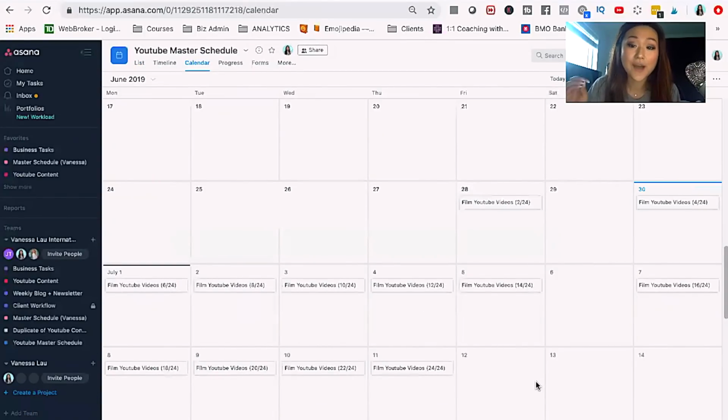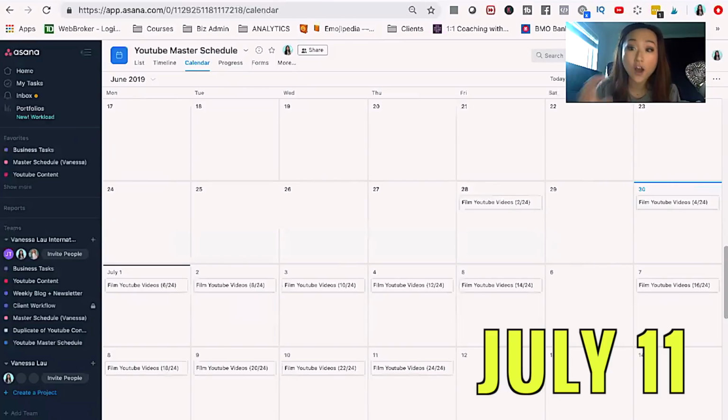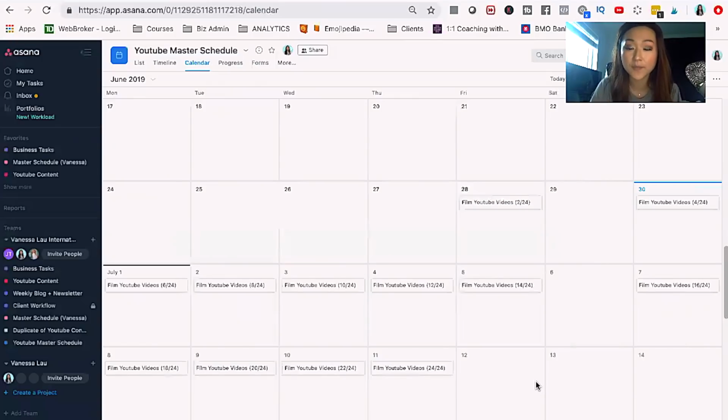All right, guys, so as you can see, while I'm plotting all of these things, it's telling me that I'm going to be finishing up my batching schedule around July 11th, which is awesome because that was a deadline that I set for myself. I wanted to finish my batching right before July 15th, which is mid-July. So in your case, it's obviously going to depend on how many breaks you want to take, what is realistic for you, but I like to plot it down on a calendar in Asana in order for me to visually see the exact deadline.